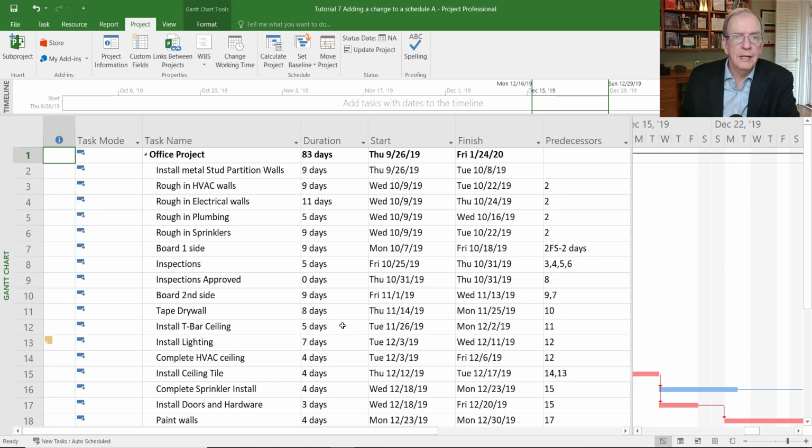Now, if we're updating, that would have the connotation that it's already been completed, so it's history, and we're just updating that process and looking at the impact it's having. If we're contemplating it, we're inserting what our plan is for it, seeing how it impacts the schedule, and then we may cost out according to the type of impact. So, for example, if this change order is impacting the schedule by, let's say, 5 days, then it's like, well, how could we get that 5 days back or shorten the impact of this by 5 days?